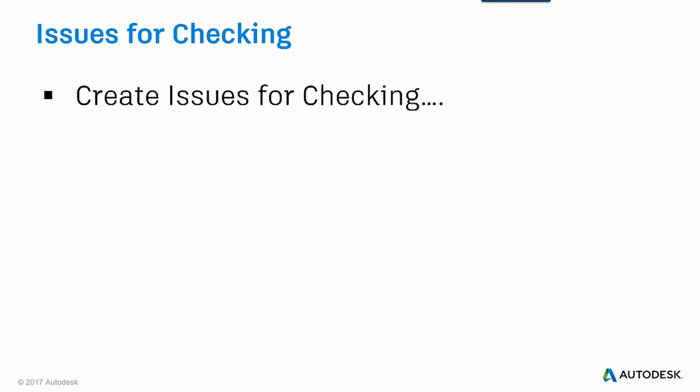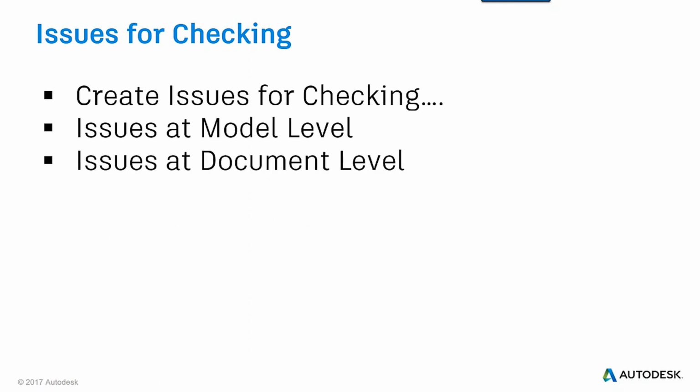But Docs itself isn't just controlling the documents or permissions on the documents themselves. Docs can be used for issues or checking. So for example, we can create issues during the checking process, either on our models, or we can create issues at a document level, and we can also create issues at a project level. From a project level perspective, we may be missing a particular specification. We can create an issue, assign that issue to somebody to resolve, even set a due by date, and anyone who's on the project can be assigned to this issue.